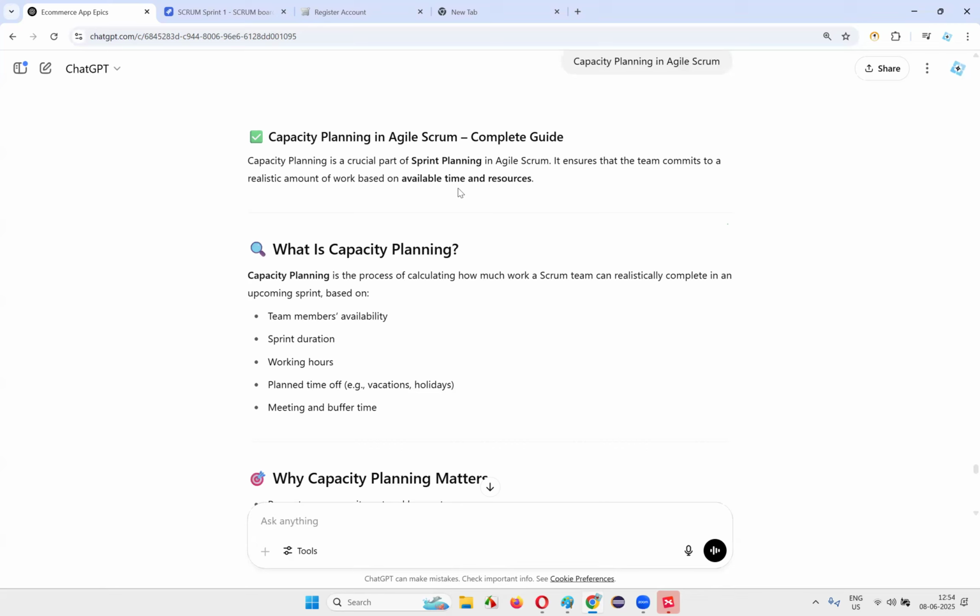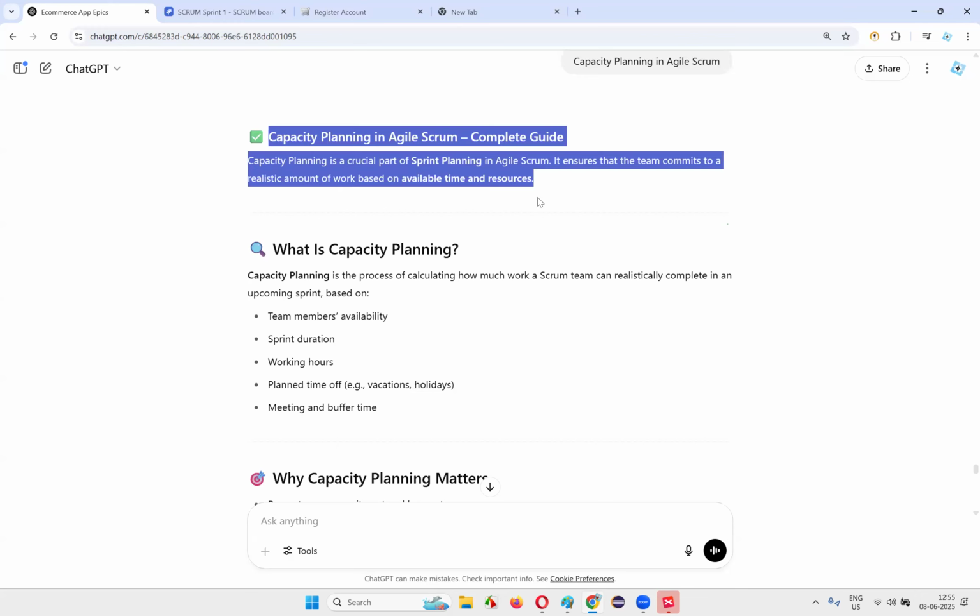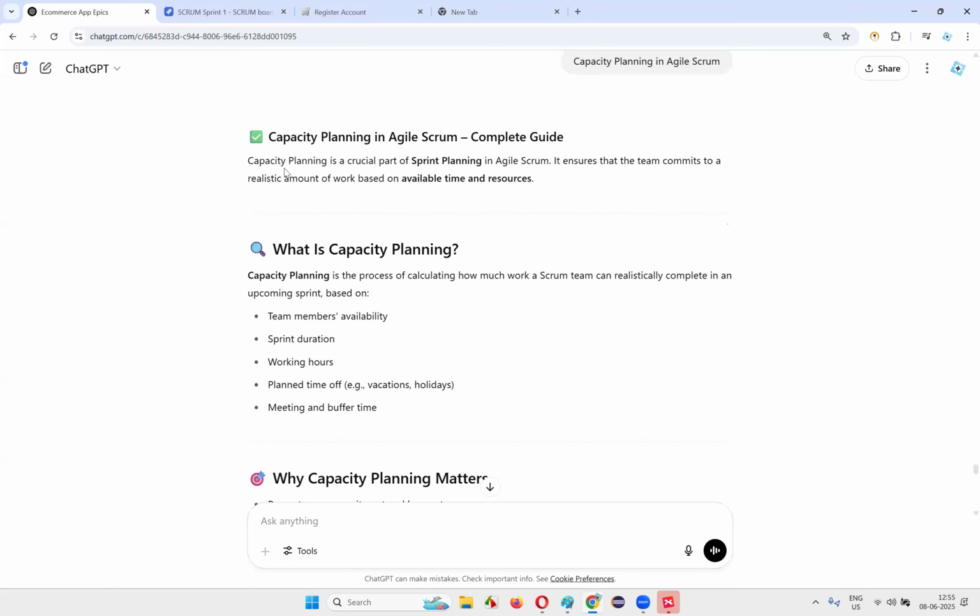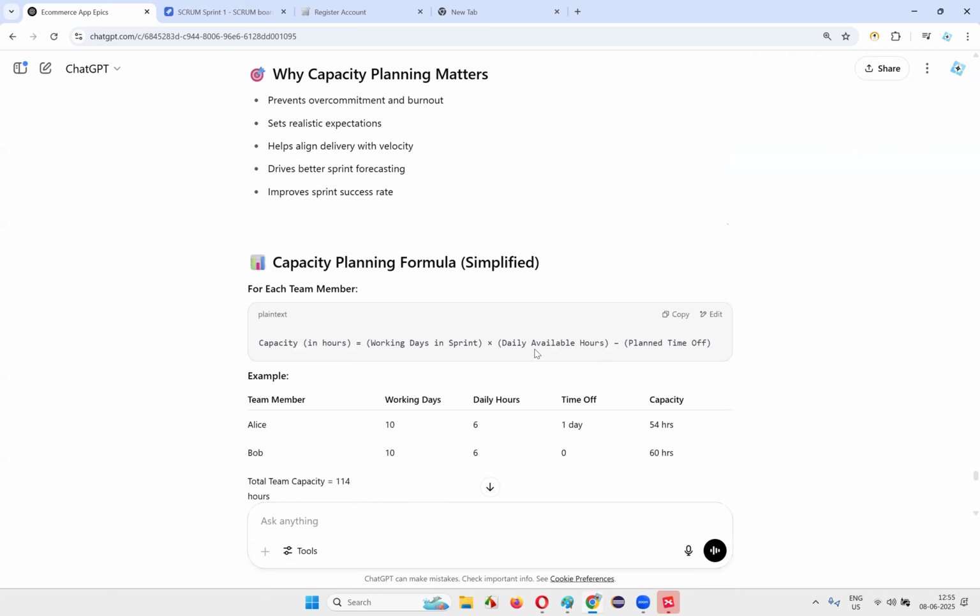We were only two people assigned to the module, and we both said a lot of work had been given by the product owner to us. Then the Scrum Master took the initiative and communicated with the product owner, and we got to an agreement where they increased some resources in the project. So that may not happen ideally in a sprint planning meeting in real time, but it happens whenever the pain is felt.